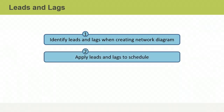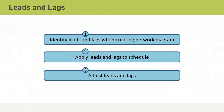You apply specific leads and lags in terms of dates to the schedule once you've identified the project's critical path and estimated its start and finish dates. Finally, once you've applied all the other scheduling techniques and a draft schedule is complete, you adjust leads and lags by going back over them and changing them as necessary to ensure the schedule is viable.